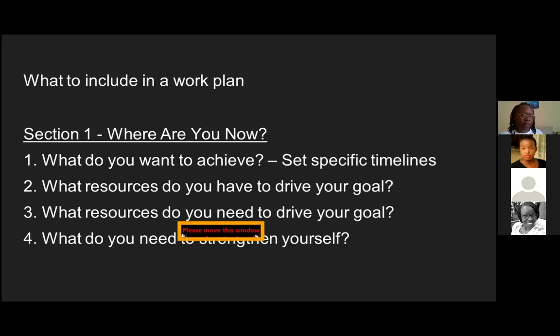114 school going girls. So maybe your specific achievement would be you want to move these 700 girls so that up to 50% of these young girls access education in the next 3 years. Yes. Okay. So you break it down into manageable pieces.